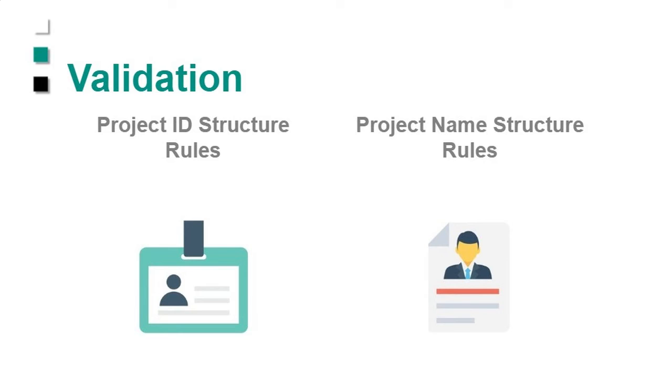And we also have some validations that you can introduce. So if you have naming conventions and numbering conventions, there are some things that you can do with validations on project IDs and activity IDs, so that you can get that feedback.